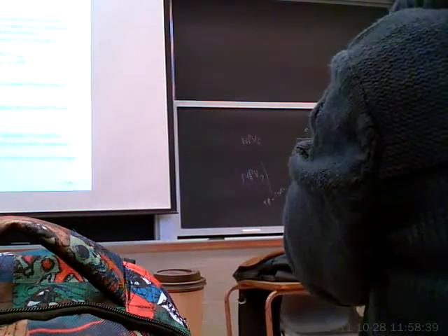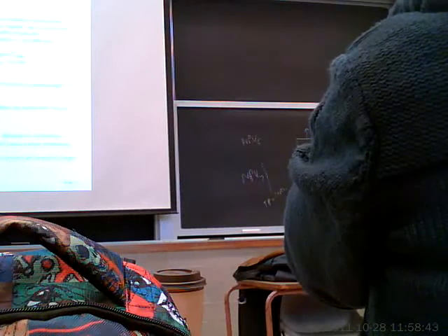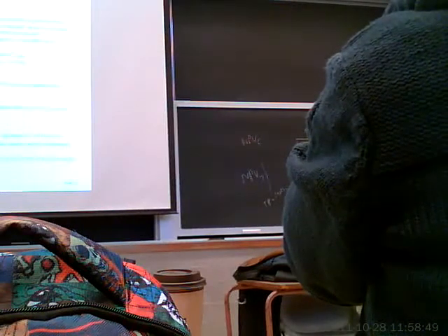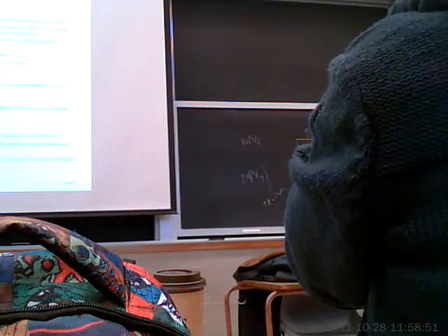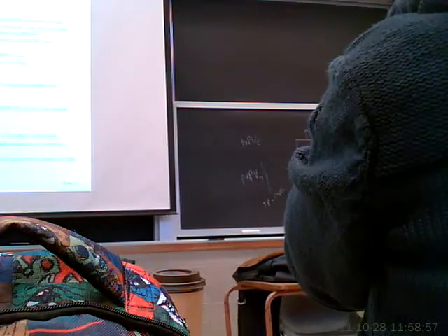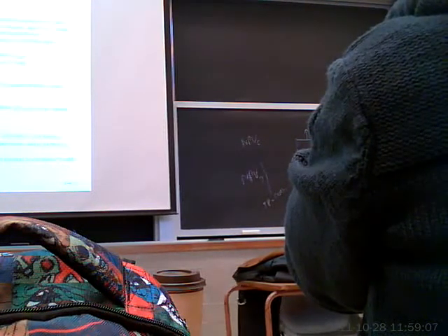I'm going to suggest that S prime 7 is going to be greater than S7, because here I've got a piece of equipment that still has 2 useful years of life, whereas here, after 7 years, the economic life is just scratched. Now, if I have a good number for this, I have something that's comparable, a 5-year number and a 5-year number, and I can figure out which one actually makes sense. That's approach 1. Truncate the longer one.